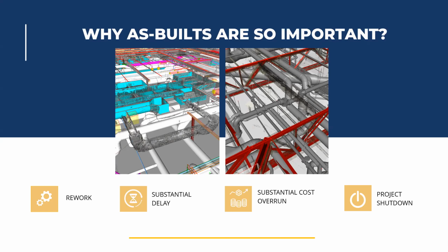And we're not talking about 1 inch or 2 inches off here. We're talking about beams being off by as much as 4 feet. With that being said, we thought we had coordinated the overhead MEP services with the existing structure. But the truth is, we had not.